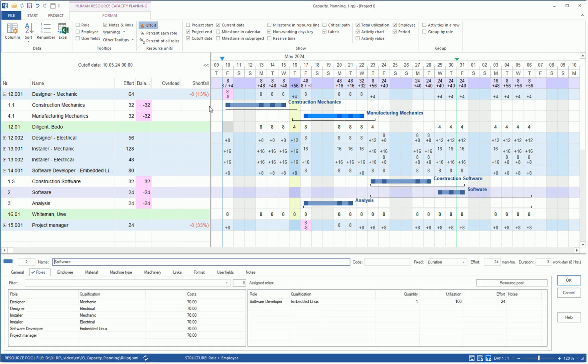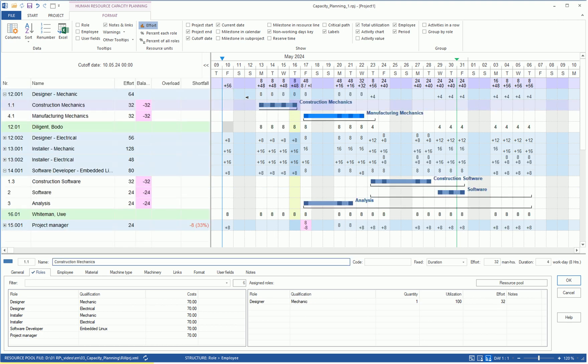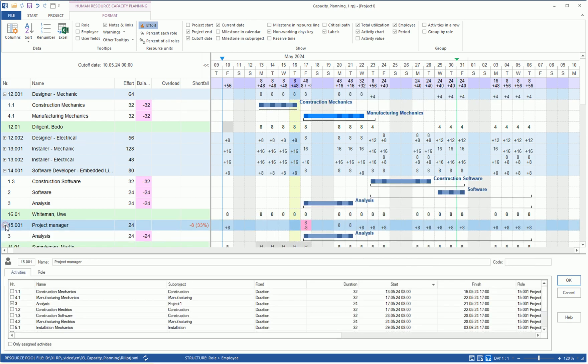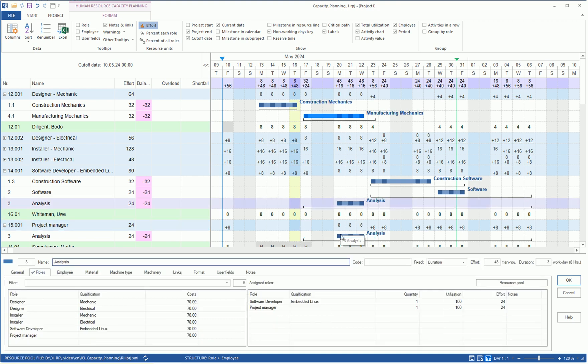To eliminate the under-coverage for the Designer Mechanic, we move the Designer Mechanic's task to the right. One day is suitable here. If we start the analysis task one day later, the shortfall conflict is also resolved for the project manager role. The proposed personnel assignment can be adjusted or confirmed.